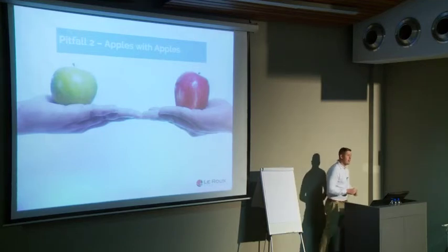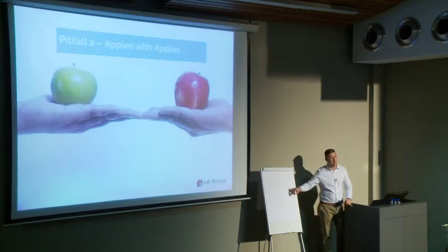So don't get confused now between earned value and these metrics. This is a common mistake that I see in the industry as well. So now we've got, this is not apples with apples. This thing contains profit, and that's why if we want to use this, then everything should be based on this, and we should extrapolate our cost to a value that includes profit.